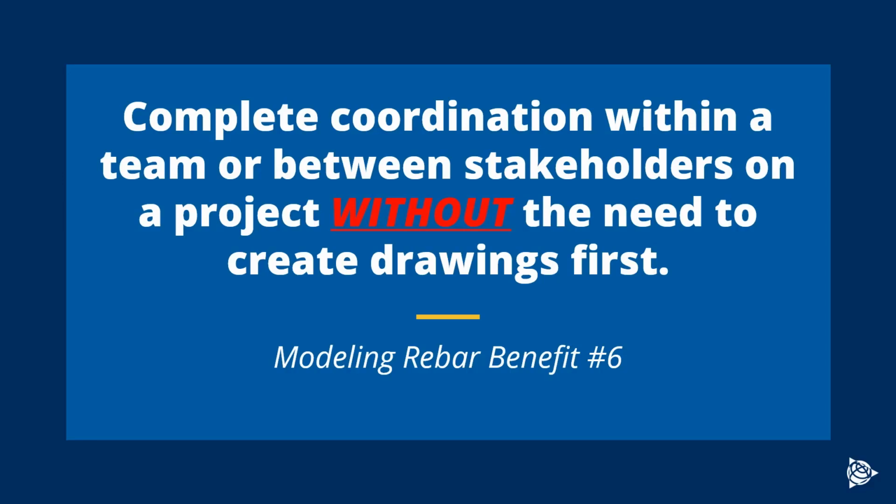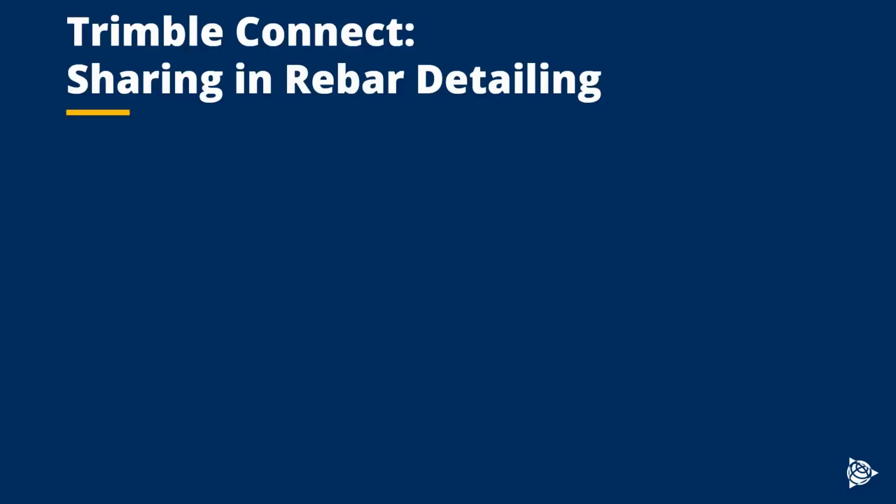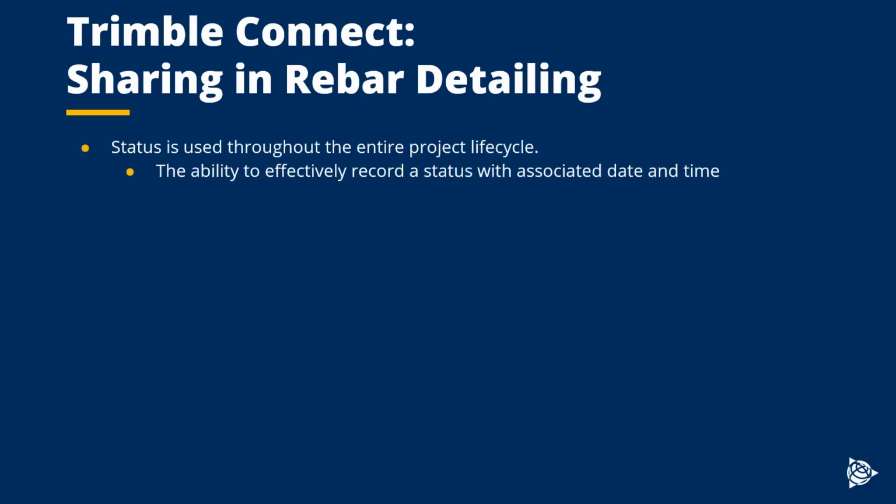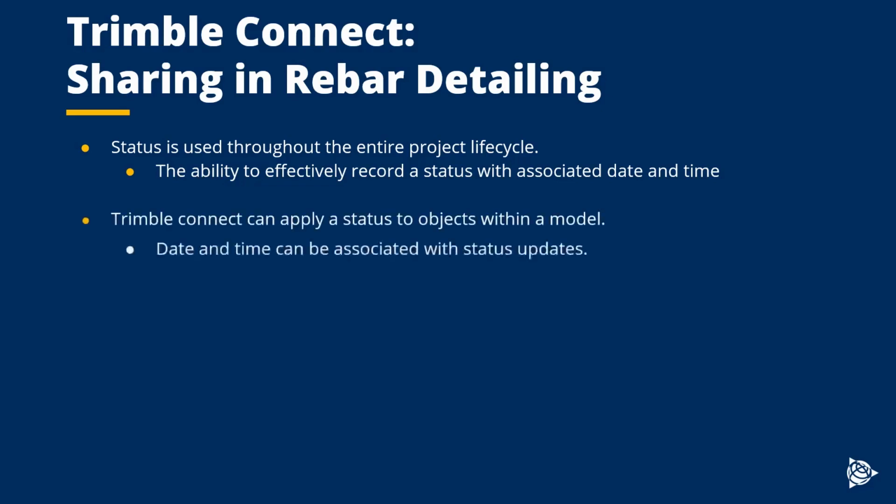So to round out this discussion on using a BIM model to collaborate throughout the process, we cannot forget to mention status sharing. We status every step of the process, whether it's from the initial concept, design phase, to pre-construction, and to construction. And rebar is involved in a good portion of that. So we can status our bar in several different ways. Now there's a status sharing tool that's available within Trimble Connect that can actually talk directly back to Tekla Structures, or it can be communicated between Trimble Connect users on different platforms such as desktop or web versus mobile.